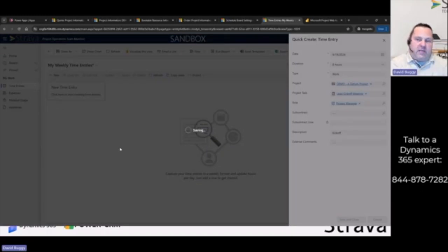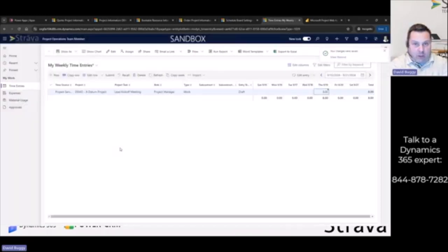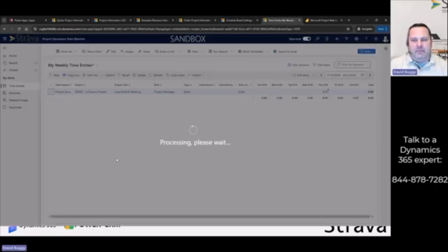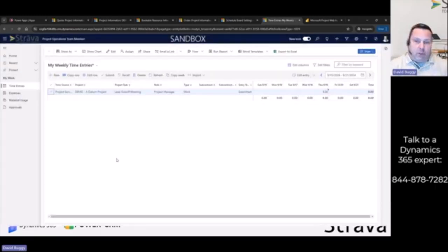So you do that, and we encourage that people do that as they work, right? I mean, super simple. And then when you have, let's say, your week's worth of time entries, you just highlight them and you click submit. And typically on average or default, the project manager on the project gets alerted, and they are the one that has to review and approve or reject time entries.